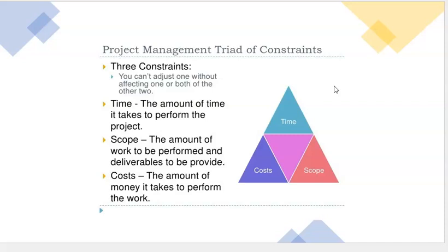It was some pretty hard conversations with the clients, saying, no, you added $35,000 extra of painting. Of course, it's going to adjust the timeline. It's going to adjust the timeline by 30 days. The $10,000 we had was actually just painting the interior doors. The $35,000 extra was actually doing the walls and the ceilings.